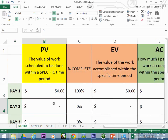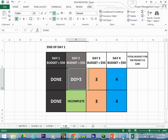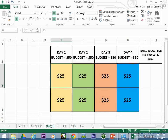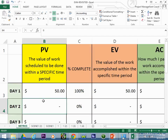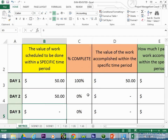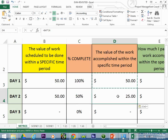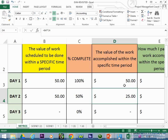Let's see what happens on day two. At the end of day two, we've only accomplished half of what we set out to do. The plan value was fifty dollars, but we only got half of it done — meaning we only got twenty-five dollars worth of work done. So the percent complete is fifty percent, giving us an earned value of twenty-five dollars.